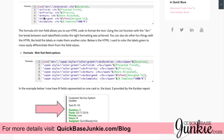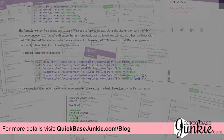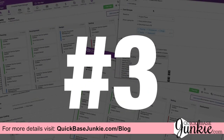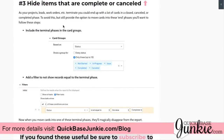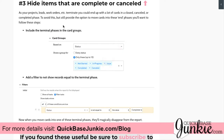Take a look at hack number two if you need to add more fields to your Kanban cards. Kanban hack number three is hiding items that are completed or canceled. As your projects, leads, or work orders finish or terminate, you can end up with a lot of cards piling up in those terminating categories like closed, canceled, or completed. To avoid this, include that group on your Kanban but set a filter so that when the status equals one of those terminating statuses, it's not shown on the report.